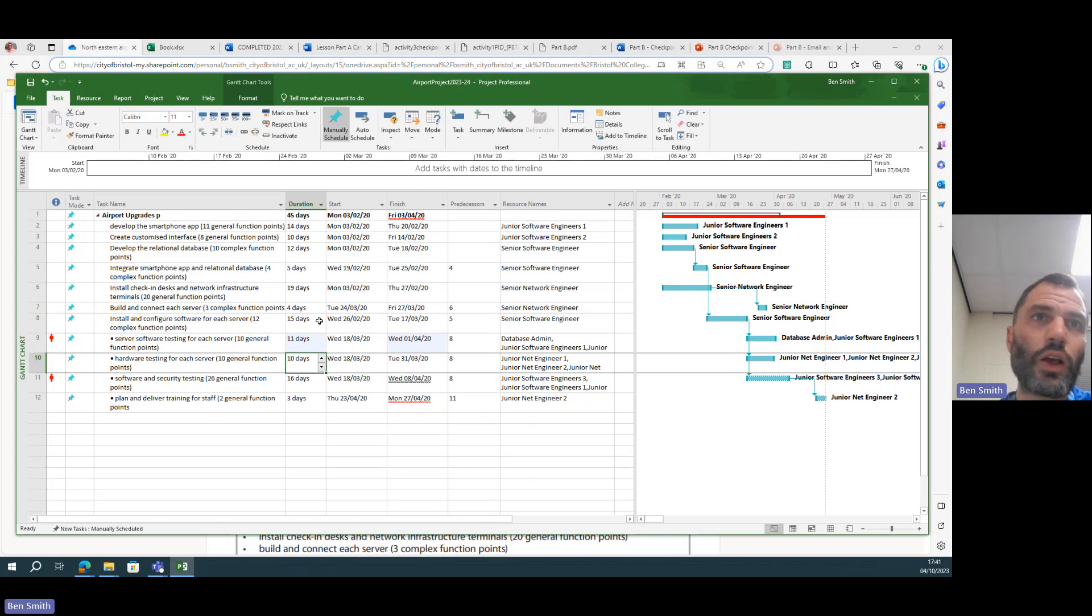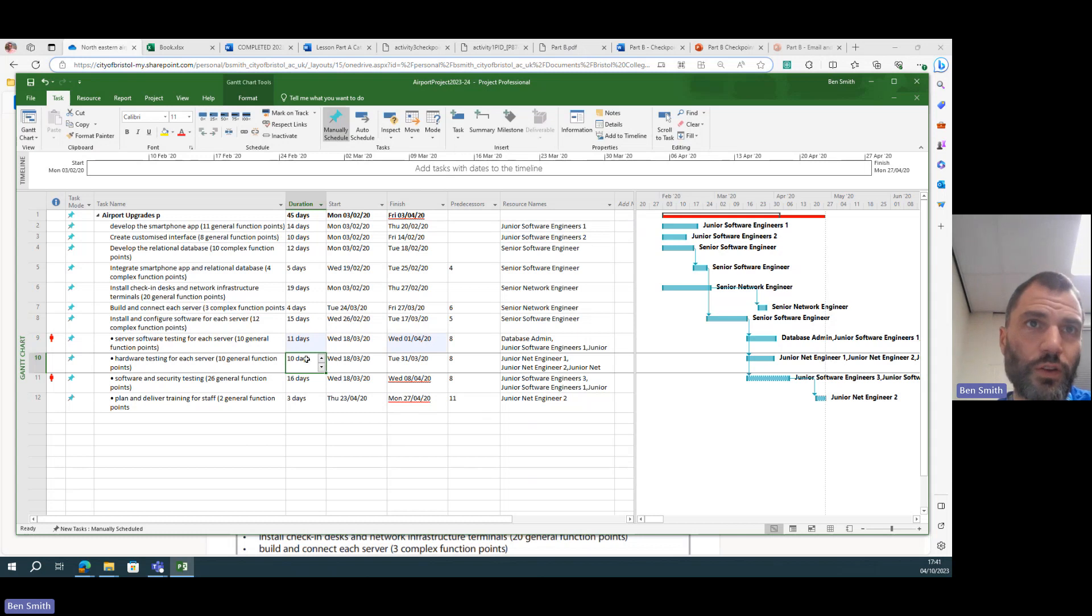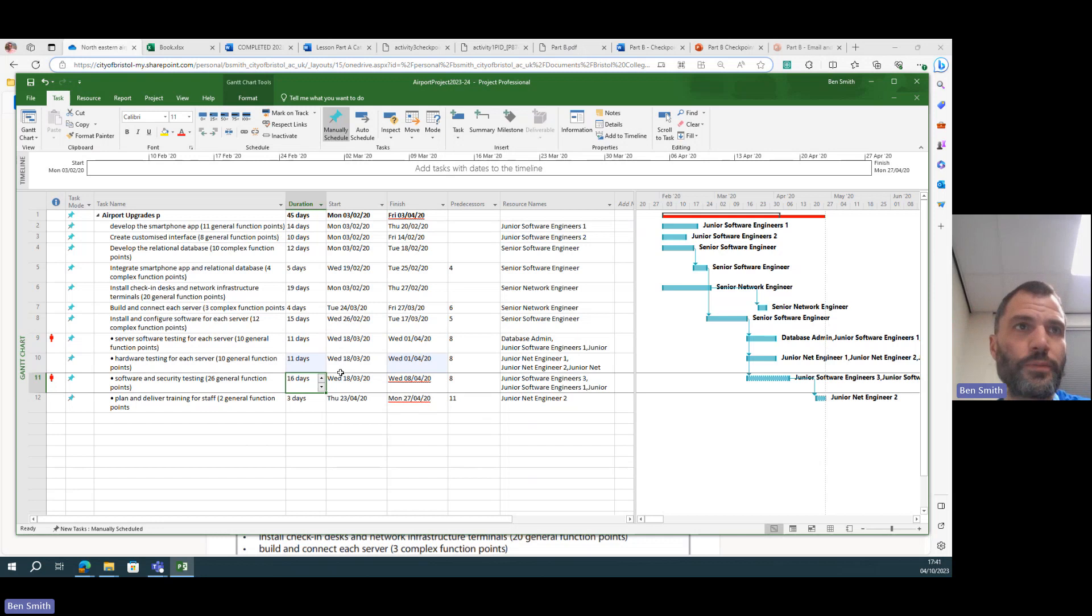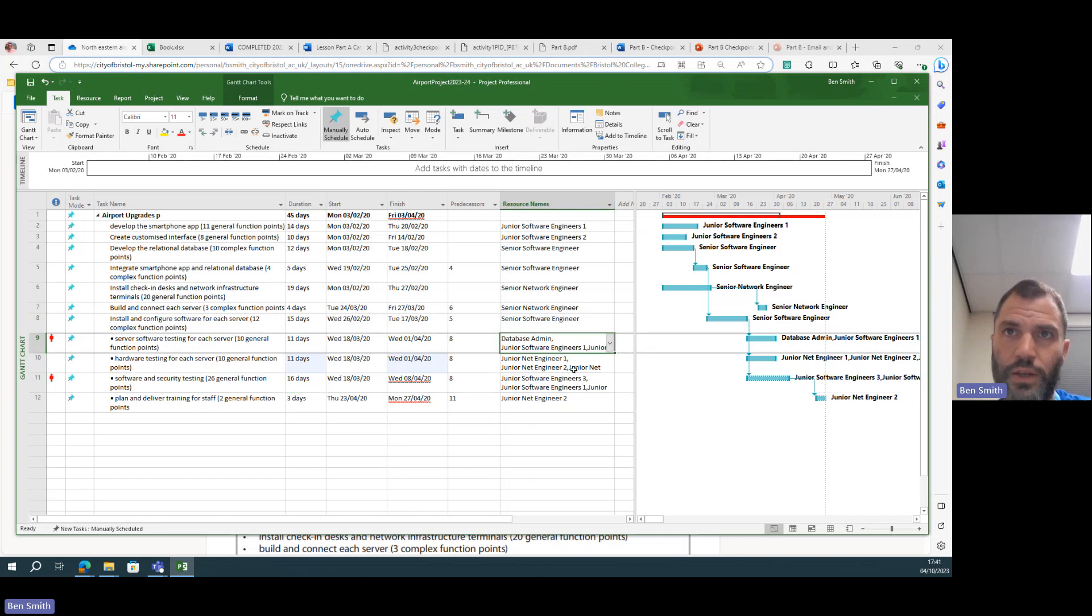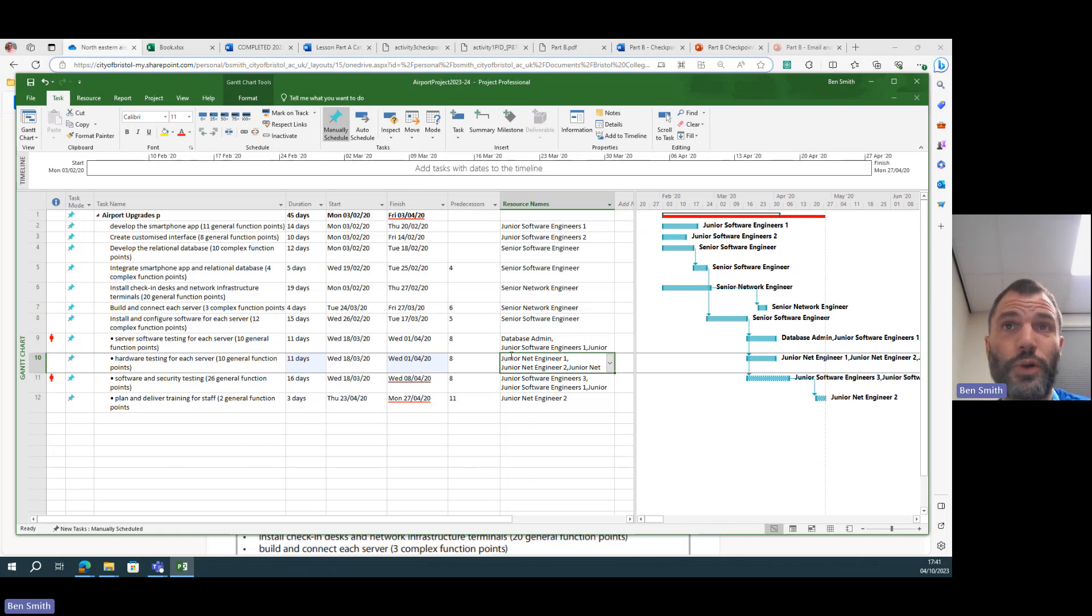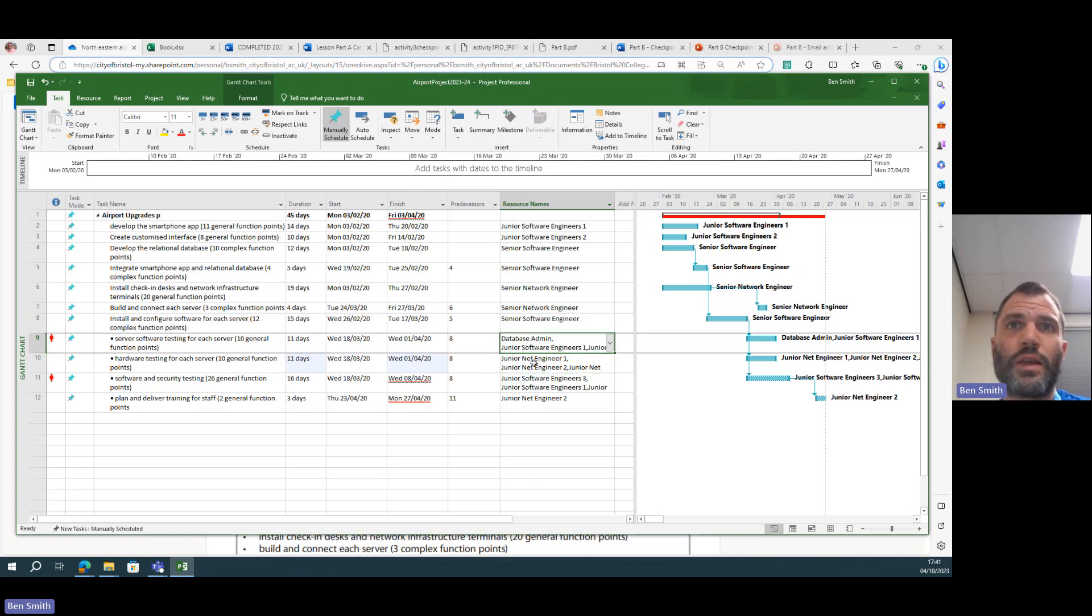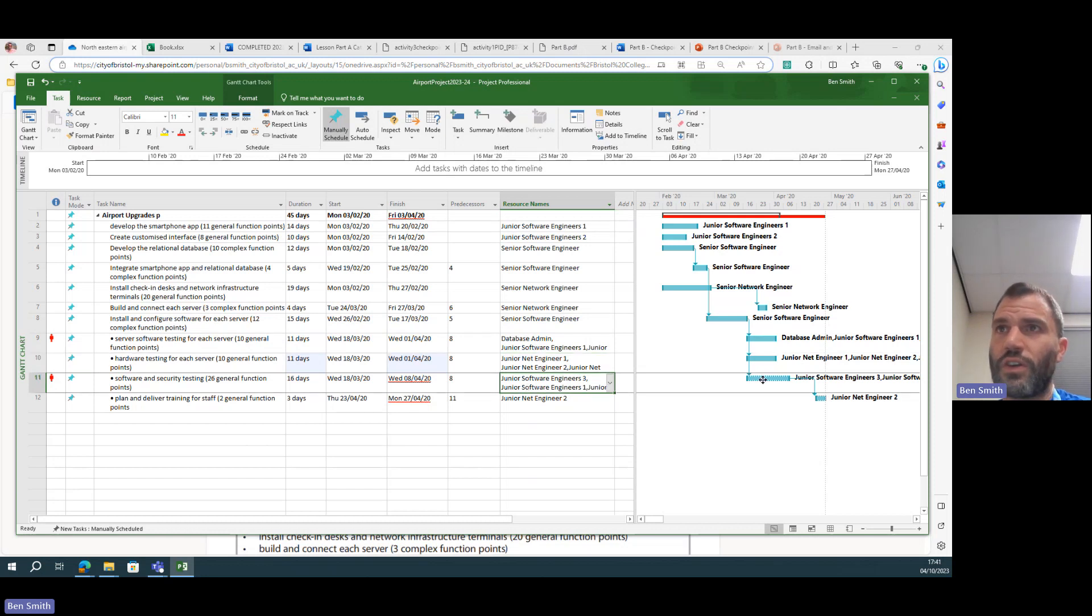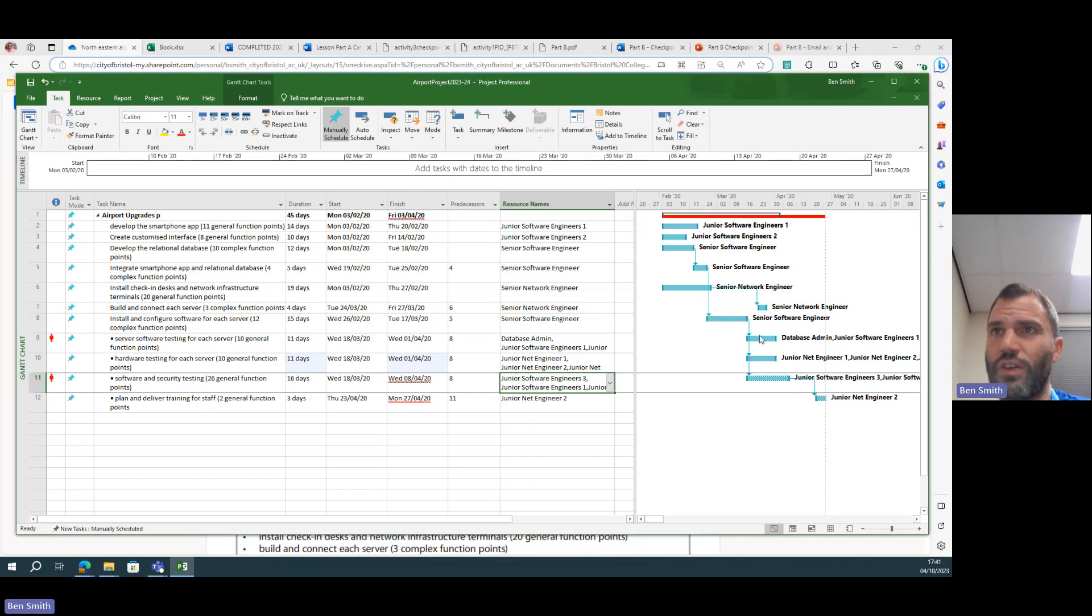But then we've got this problem, so let's cut that down by three. So on the conservative side we'll say 11 days and not 10, we'll go over not under. It'll take 10 days to do that. This is something you could talk about in your project management control, how you manage the project. So database admin, junior network engineer on that. So these guys can't start on this task until they've done this task, until they've finished this one.